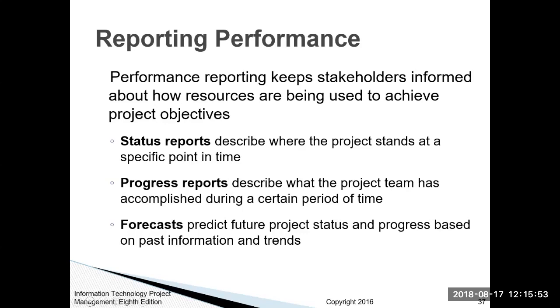And if we go back to trying to get a county permit for something, for example, if you got the permit, or if you have an estimated time when you'll get this permit, a lot of these outside dates that you have no control over, or if it was an inclement weather issue, you need to relay that to your entire team so that they understand what the progress is, and maybe they can move ahead on something else. But a lot of times they probably can't, and then everybody has to sit there and wait.